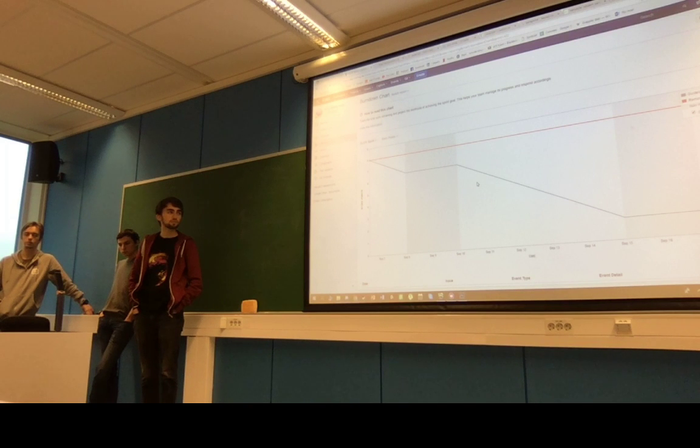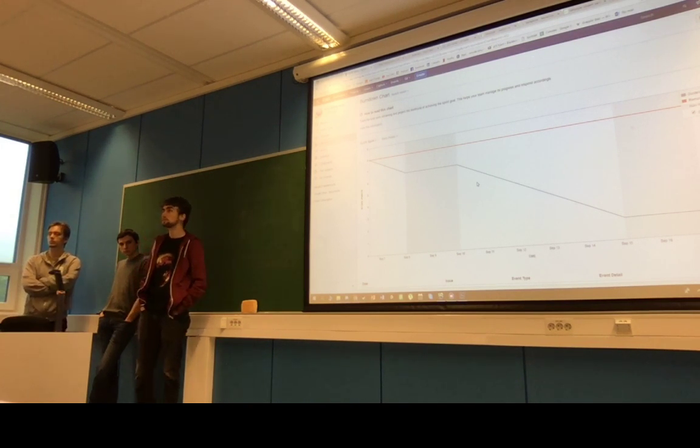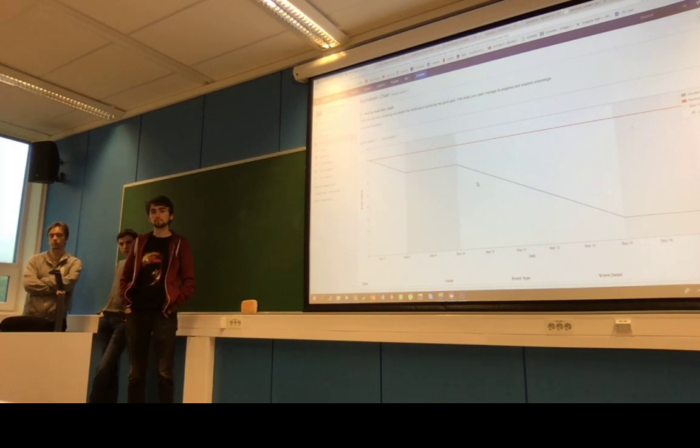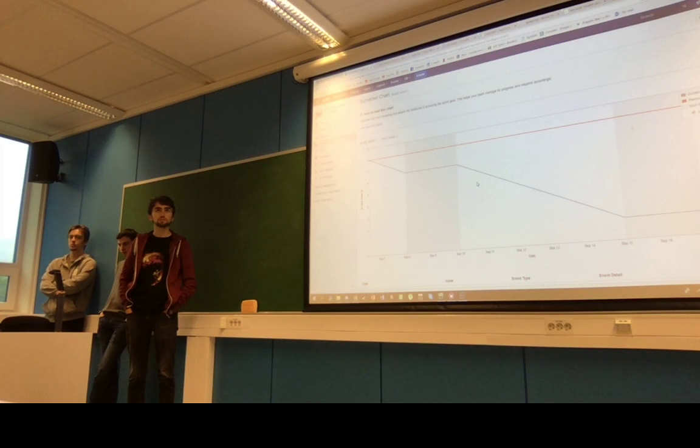And that does change in time too a little bit, right? So if you started off the project having, let's say, 2 hours per story point, you will notice that after a few sprints you are more efficient and your story point doesn't take 2 hours anymore, it takes like 1 hour on average, right? So there will be some change in those translations as well. So then you adjust, right? It's a tool, you're using it and you adjust your usage of it every time.